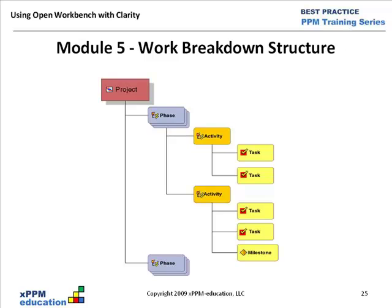How many breakdown levels of summary tasks are there? That's somewhat a user choice. In this example, I show a phase and activity — two levels of summary tasks above the detail. In our course exercise, we only have two levels: phase and detail, skipping the activity level. You can have two or three, but be careful with too many summary levels, as it can get confusing for people reporting work in timesheets and for the project manager trying to control the plan.